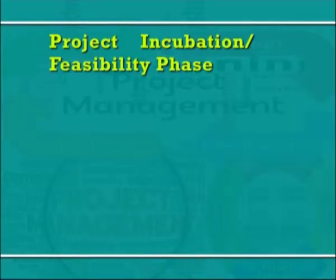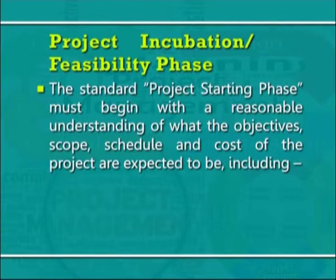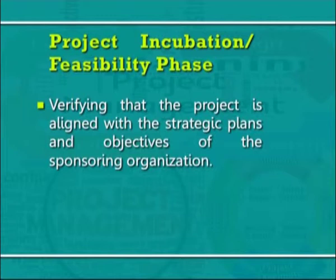Project incubation feasibility phase — when does a project truly start? How does it grow from an idea in someone's head into an approved concept? In almost every case, the standard project starting phase must begin with a reasonable understanding of what the objectives, scope, schedule and cost of the project are expected to be, including what the project will create and what business benefits will be produced for the organization. Verifying that the project is aligned with the strategic plans and objectives of the sponsoring organization, and a reasonable idea of the overall scope together with its expected time schedule, cost and whether the needed money and other key resources can reasonably be expected to be available, will be verified during the project starting phase.